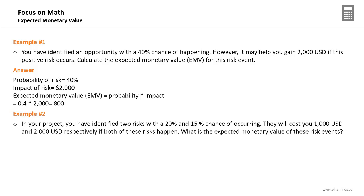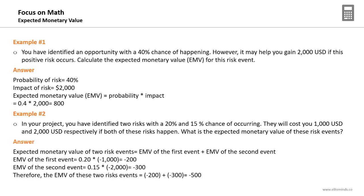Another example: you have identified two risks with a 20% and 15% chance of occurring, costing $1,000 and $2,000 respectively. You calculate the EMV for both risks and sum them. Both are threats, so you assign negative signs. The total EMV for the project is the sum of all individual risk EMVs — positive for opportunities, negative for threats. In this example: −$200 + (−$300) = −$500 USD total.